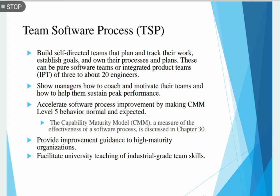Each project is launched using a sequence of tasks considered as follow scripts: review project objectives with management and agree on and document team goals; establish team roles; define the team development process; make a quality plan and set quality targets; plan for the needed support facilities; produce an overall development strategy; make a development plan for the entire project; make a detailed plan for each engineer for the next phase; combine the individual plans into a team plan; rebalance team workload to achieve a minimum overall schedule; and assess project risk and assign tracking responsibility for each identified risk. This concludes the overview of TSP and PSP.